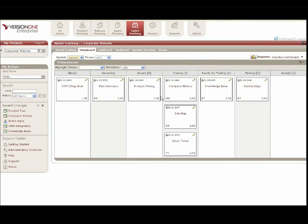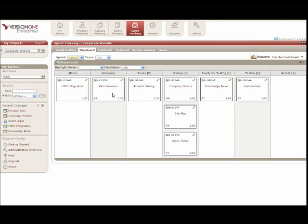Looking at the storyboard I created for this demonstration, I tried to use a common workflow. 'None' here might represent items you want the team to start focusing on — the highest priority items in the backlog, so they're just visible. Then 'Grooming' — where you're trying to get them ready for development: do we have the right acceptance criteria? Does the team have an estimate? 'Ready' means it's ready for coding. 'Coding' is where you're doing software development, writing your code. 'Ready for Testing' means the software development team thinks it works as per the acceptance criteria. 'Testing' — you're verifying that with your testers. And 'Accept' is where the product owner might do a quick look and close the item.